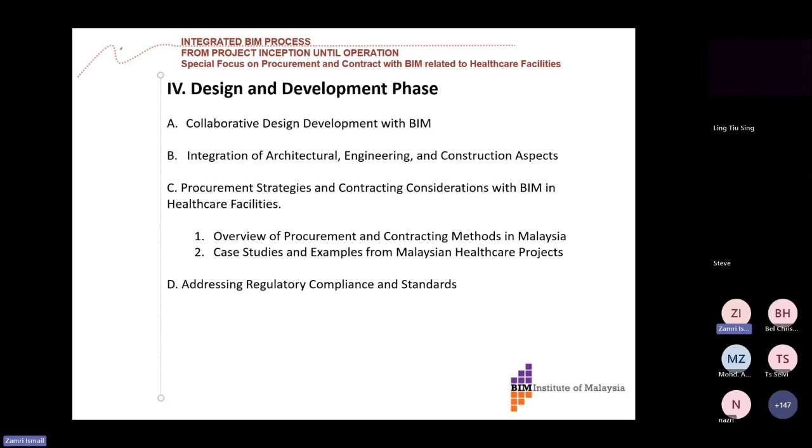Simply because sometimes the contractor may see the requirement under JKR BIM requirement as purely contractual. But actually, if you don't get the BIM manager involved from the beginning, or you don't have proper LOD up to LOD 300 model, you may have problem at LOD 400 and 500. To elaborate further, some site supervisor by discipline, for example, like mechanical or even electrical, they may not approve for construction or even installation until they see the shop drawing, until they approve the shop drawing that is clash-free generated from BIM model. So this is where the contractor may have delay due to lack of BIM model and clash-free.